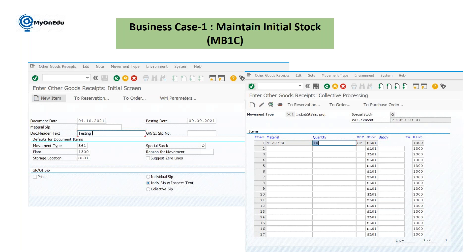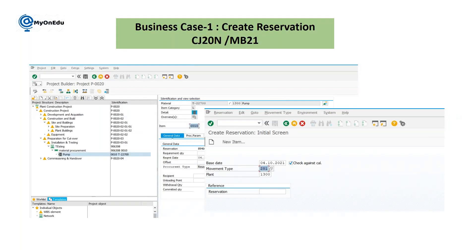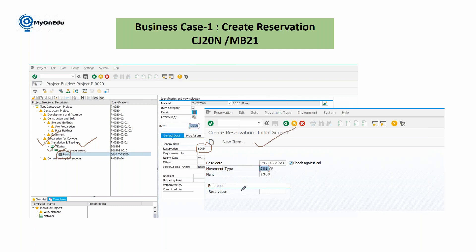Once the initial stock is done, the project manager or site engineer creates a reservation. He opens the project in transaction CJ20N, finds the WBS element that already has stock, and assigns material to the network activity. As soon as he assigns it, the system automatically creates a reservation. You can also create a reservation manually in MB21, but for automatic creation it must be done in CJ20N.